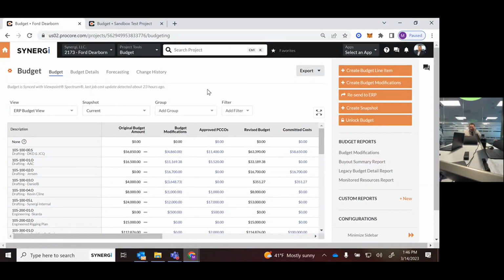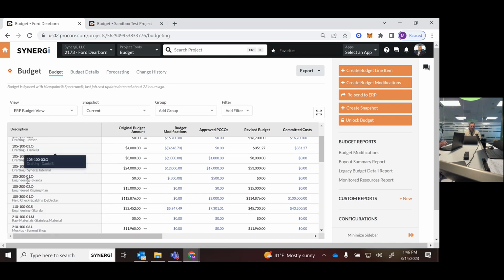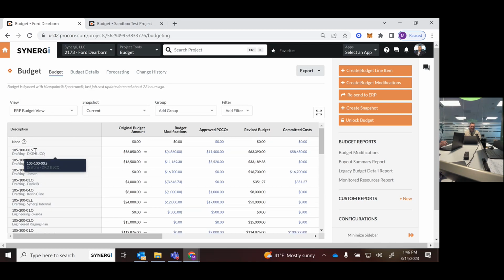Okay. So budget. What we're doing in pre-construction and estimating, guys, is we're going through and loading these budgets. Notice how much cleaner this already looks with what it is and what the cost code is. These are all correct cost codes. The amounts all appear to have made sense when they were originally loaded, and the budget has been locked.